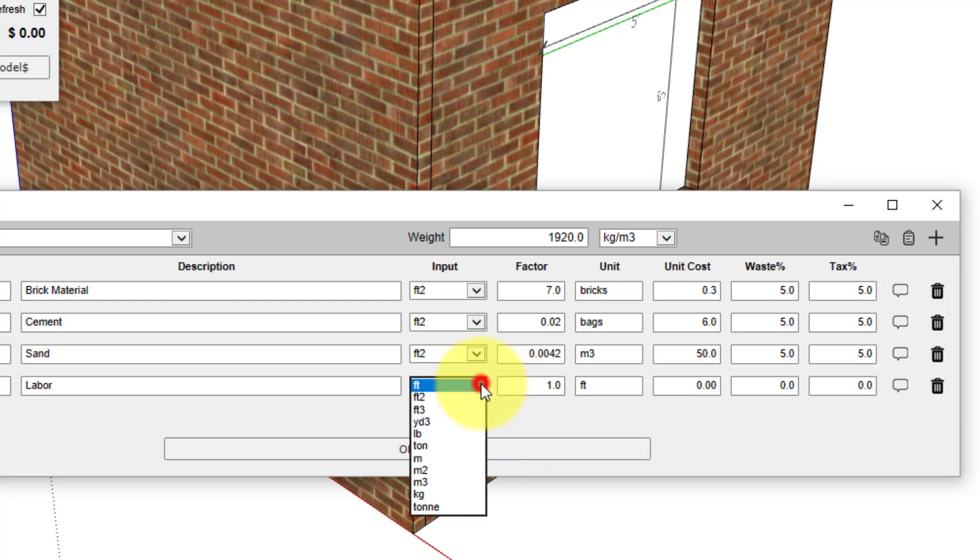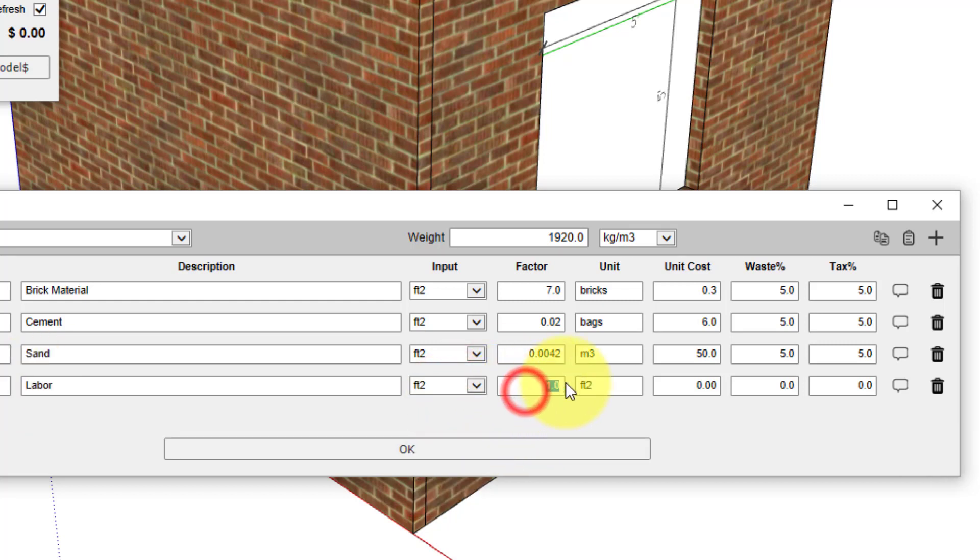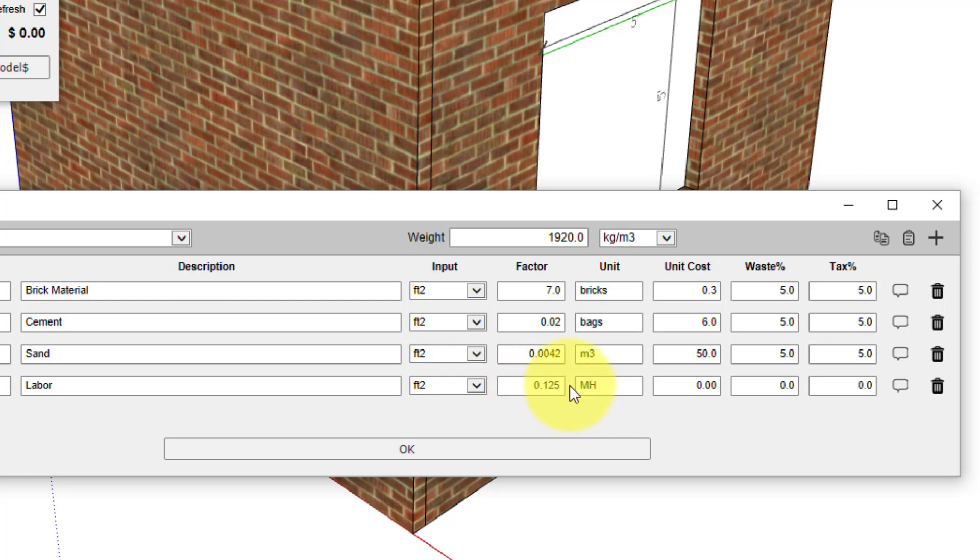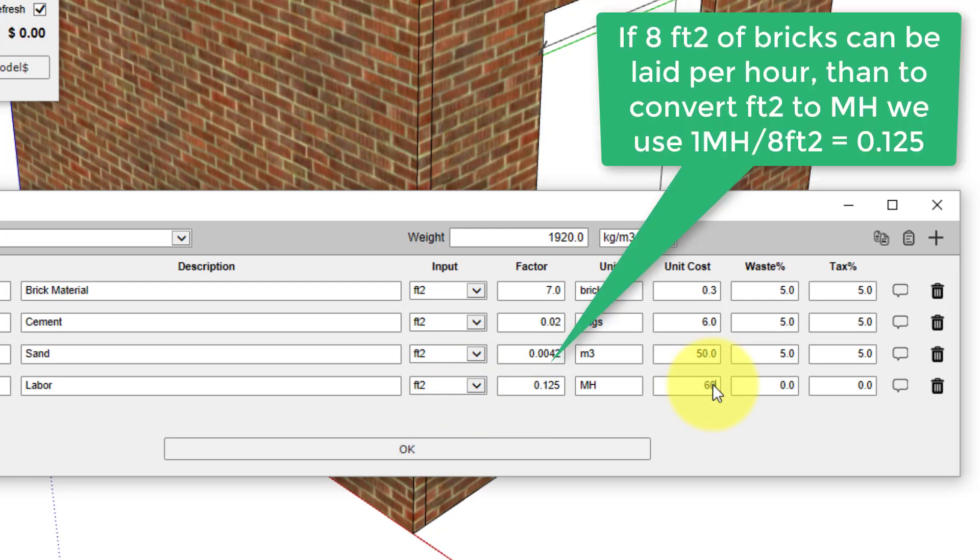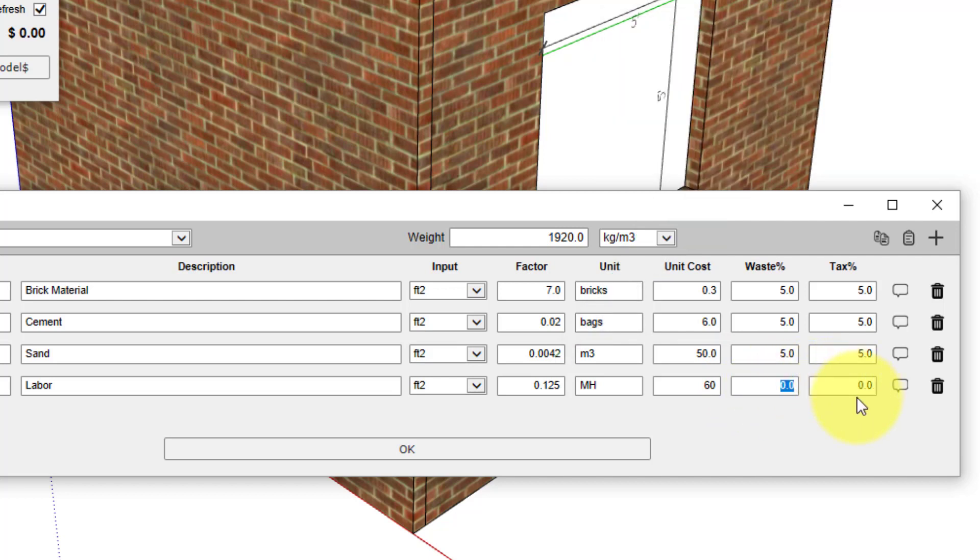Again, we'll use an input of square feet, and the reported unit we will have as man-hours. In this case, I know my bricklayer can lay eight square feet per hour, which results in a conversion factor of 0.125 man-hours per square foot. He's going to charge me sixty dollars an hour, and he's really efficient, so he's not going to have any waste associated with his work. Now we've applied four cost lines to this brick layer.